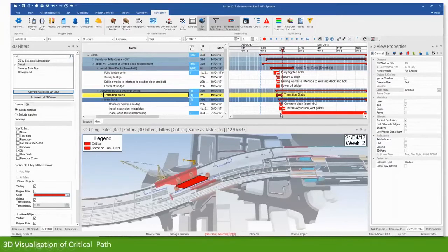Now one question always comes, can we do a critical path or can you do a 3D visualization of the critical path? This is very important from a project perspective. I understand, because if you know this is my critical path and visualize that, as a project manager, you can go to that for pillars, or you can go to this place and just check if this has been working well or not. You can delegate work for other parts or other resources to someone and concentrate on this part. So this is the importance of 4D scheduling.